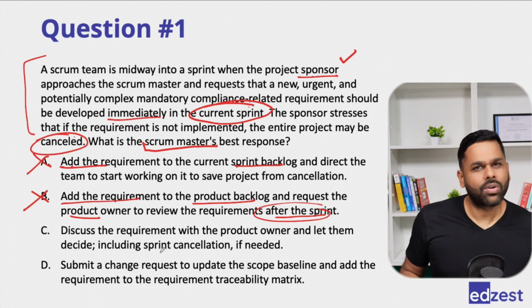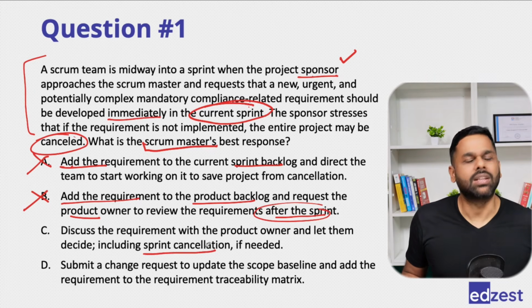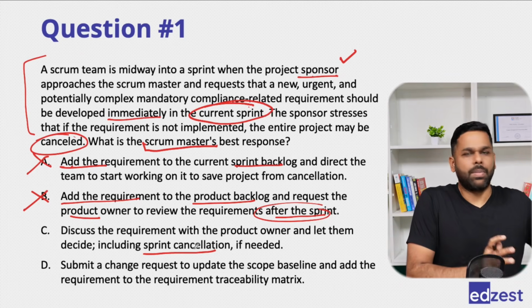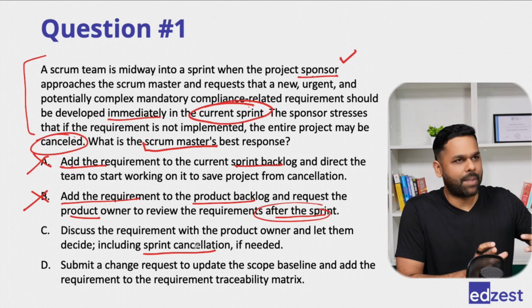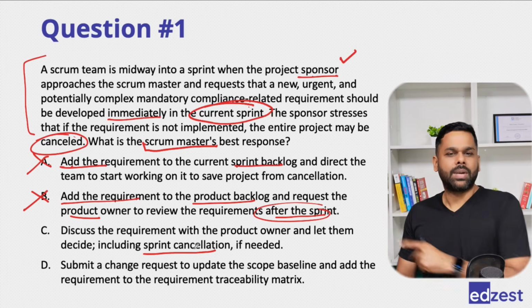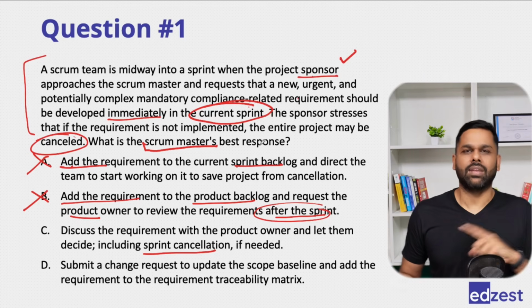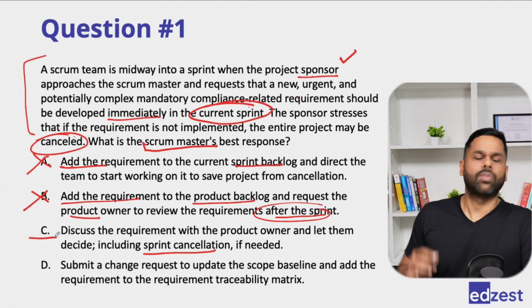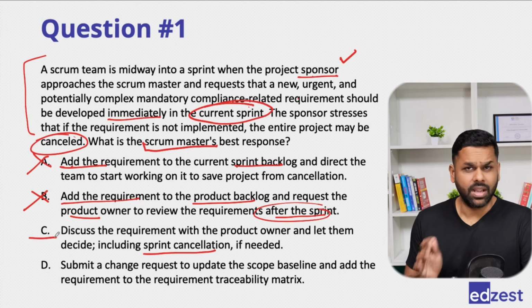So, what the product owner will have to do, they will have to cancel the sprint if they think that yes, this is very, very important. Whatever we are doing becomes obsolete, whatever they are doing becomes absolute low priority. Let's cancel the sprint. First, start another sprint, carry out these requirements, and then we'll do it. Let the product owner take that decision. Looks like a very good choice. So, we'll keep it. As you said, if we are 100% sure, we'll eliminate it.